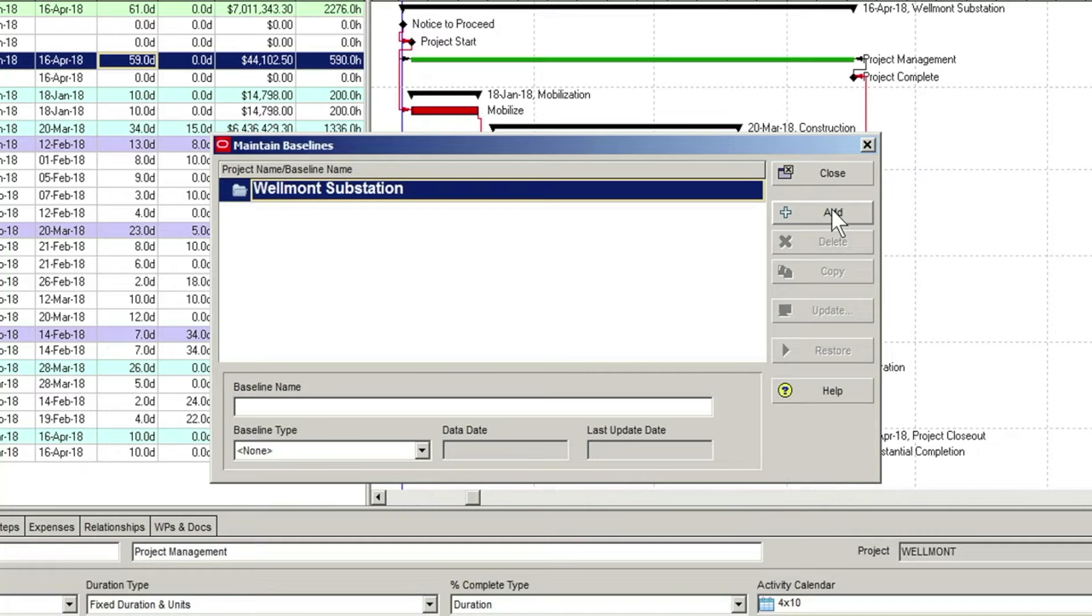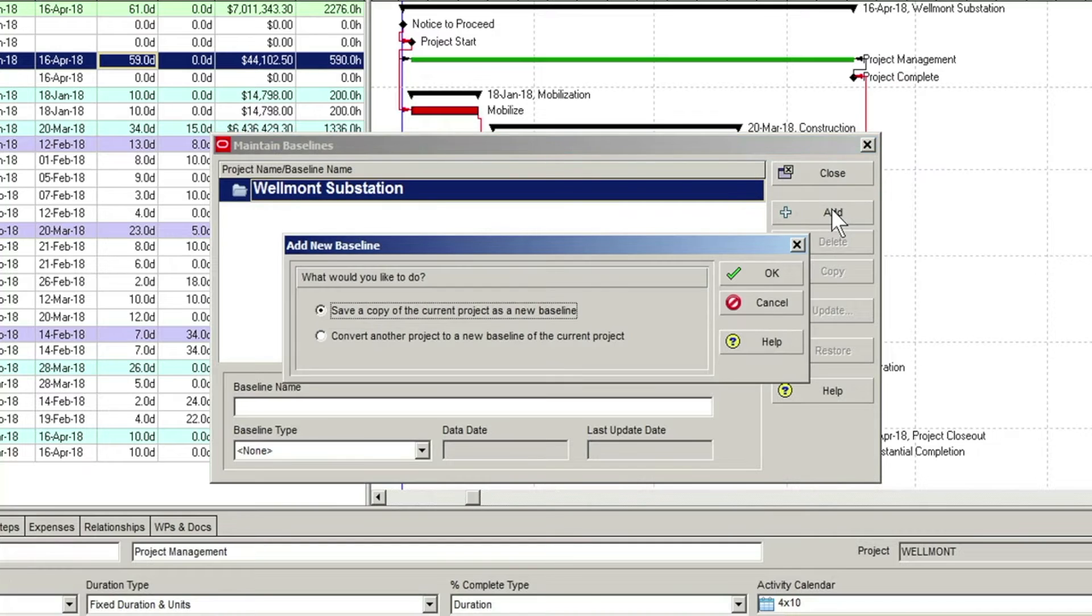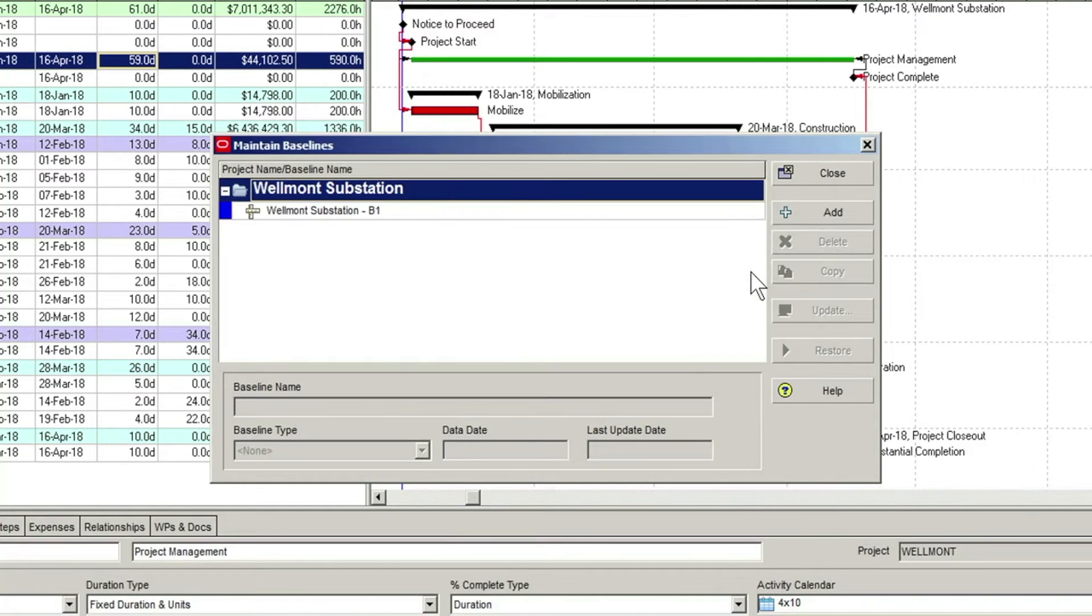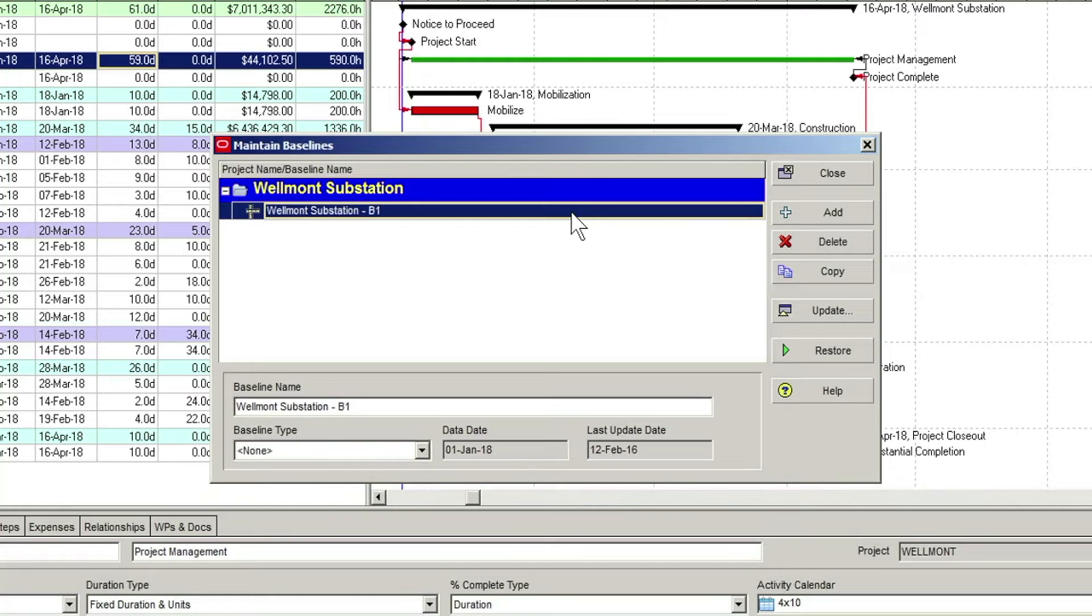In the Add New Baseline dialog, we will go with the default option to save a copy of the current project as a new baseline. After a couple of moments, a baseline copy of the project appears under the project heading with a suffix of B1.